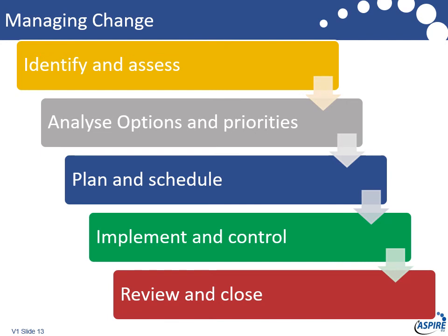The one key technique we need to consider under change control is how to manage a change, because whichever of those 6 areas it's affecting, we need to do this in a systematic way. Now, the seeds of failure, particularly in big programs and projects, are set by weak change control. And actually, that's not to say people are not doing the change control in a robust way, but it's the failure to see the implications.